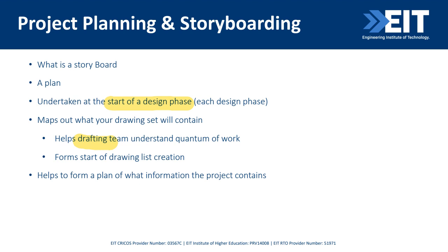And what comes out of this is the beginning of our drawing list, which some of you might know as our deliverables list. And that's the key outcome for this storyboarding process. So essentially, it is that plan: what do we expect we're going to be doing from an electrical design perspective specific to this particular project.